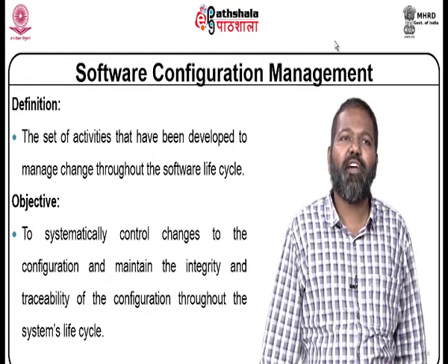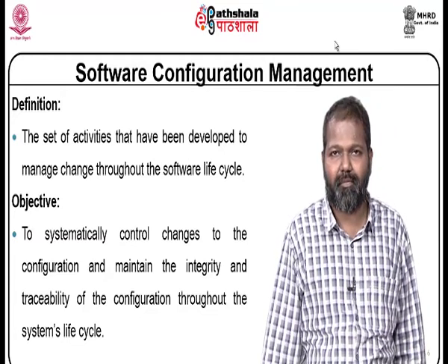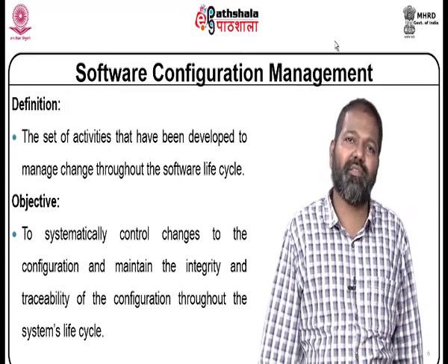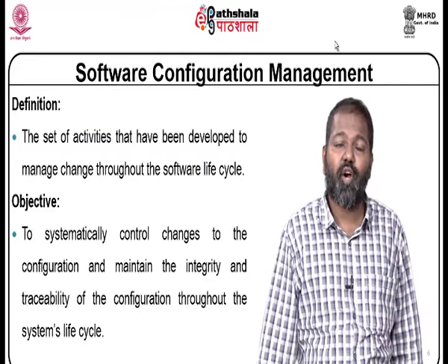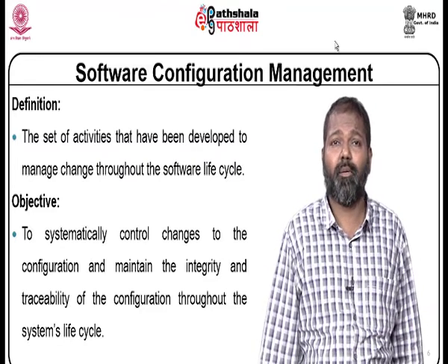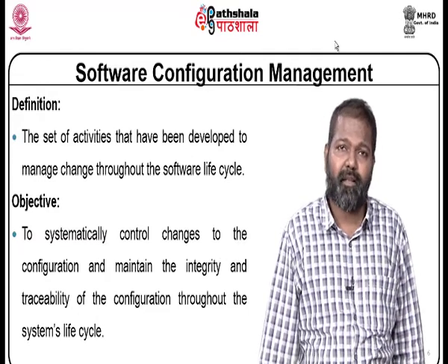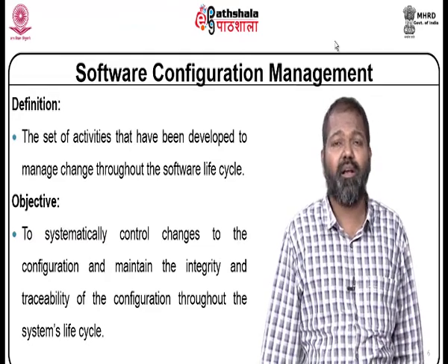Similarly, when you are in coding phase, there is a change in requirement. When you address the changing requirement, not only the cost gets affected, the schedule also gets affected. Incorporating changing requirements sometimes may cause a schedule slippage.